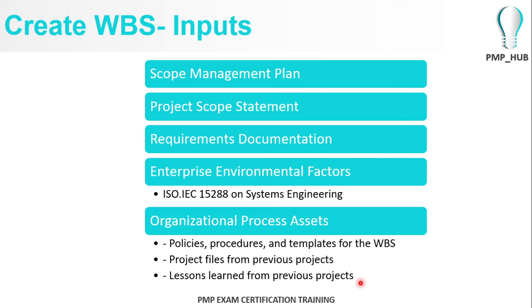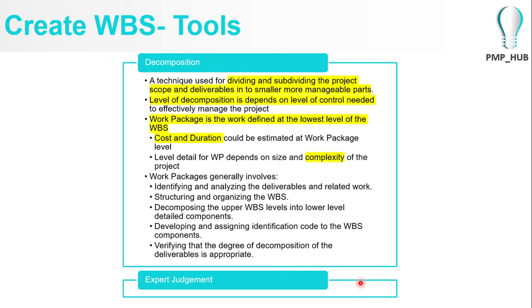So, dividing: how much to divide is more of a judgmental call. Basically, it's up to you. The lowest level that you usually divide down to is called a work package. Again, coming back to your house project, from the entire project you divide into maybe phase 1 and phase 2. So the first breakdown will be phase 1.